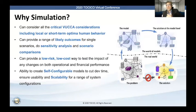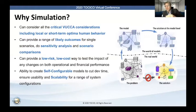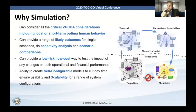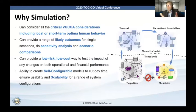We can also do scenario comparisons and test different rules against each other, including hybrid rules — for example, one is a static WIP limit and another a dynamic limit where we specify the rules under which conditions the WIP limit should be increased or decreased. All of this can be done in simulation before you ever have to implement it, providing a very low cost, low risk way of testing the impact of any change on both operational and financial performance. We can incorporate all the financial side — variable and fixed costs, the revenue side, at what point do you get revenue from your client, whether at phase delivery or program level. We can also build in penalties for late delivery or bonuses for early completion, run multiple scenarios, and see how they work.